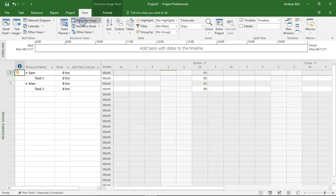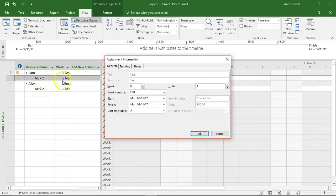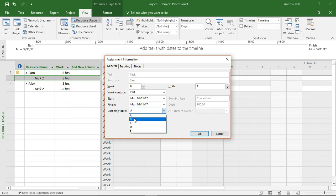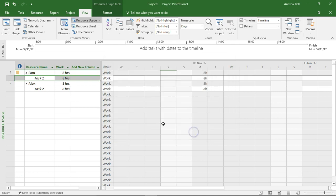So back to the usage views, and here's Sam working on task 1 which is going to be at rate B. Now rate B is £40 an hour more than rate A and he's working eight hours a day. So eight times forty, this should be £320 extra.